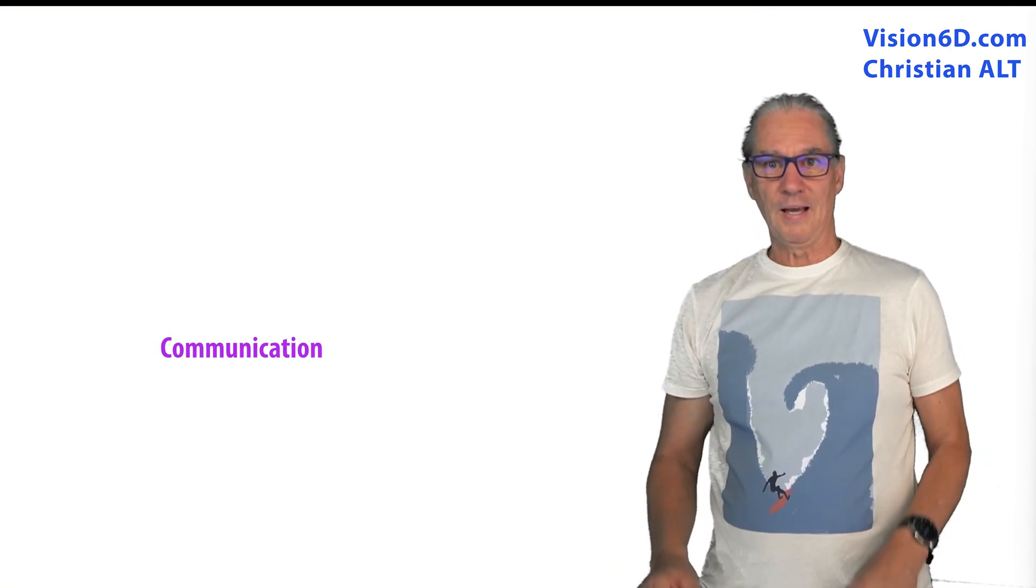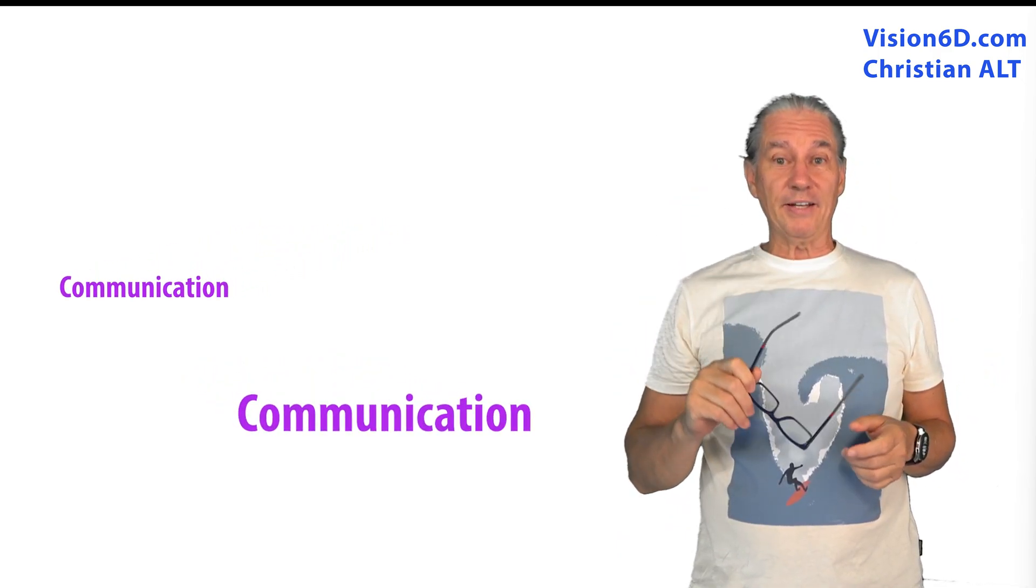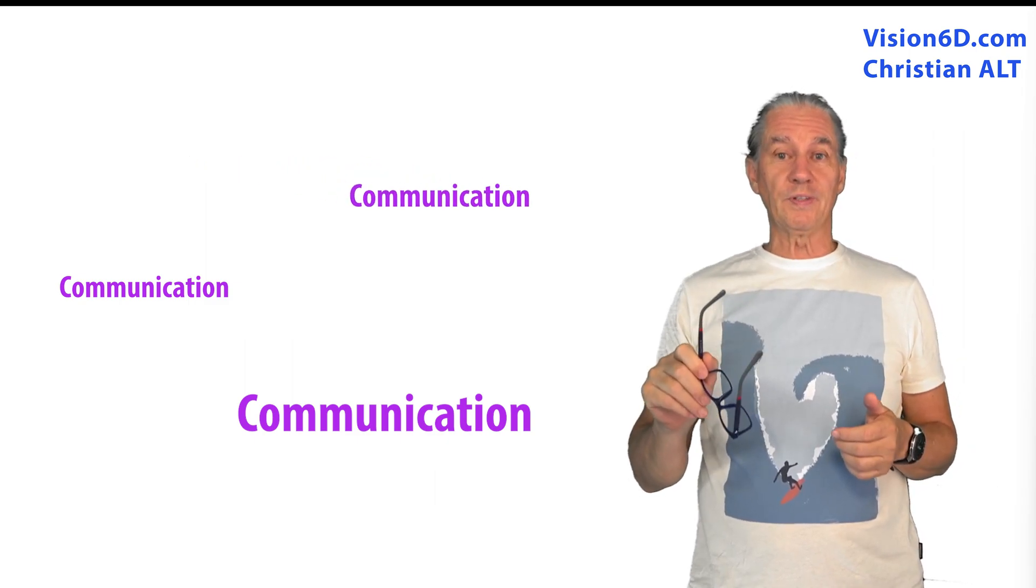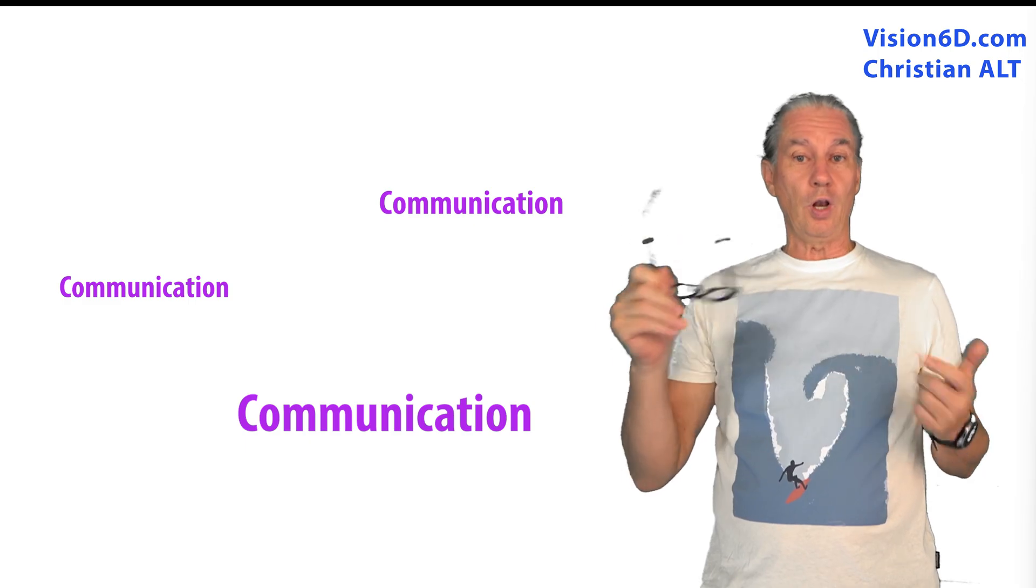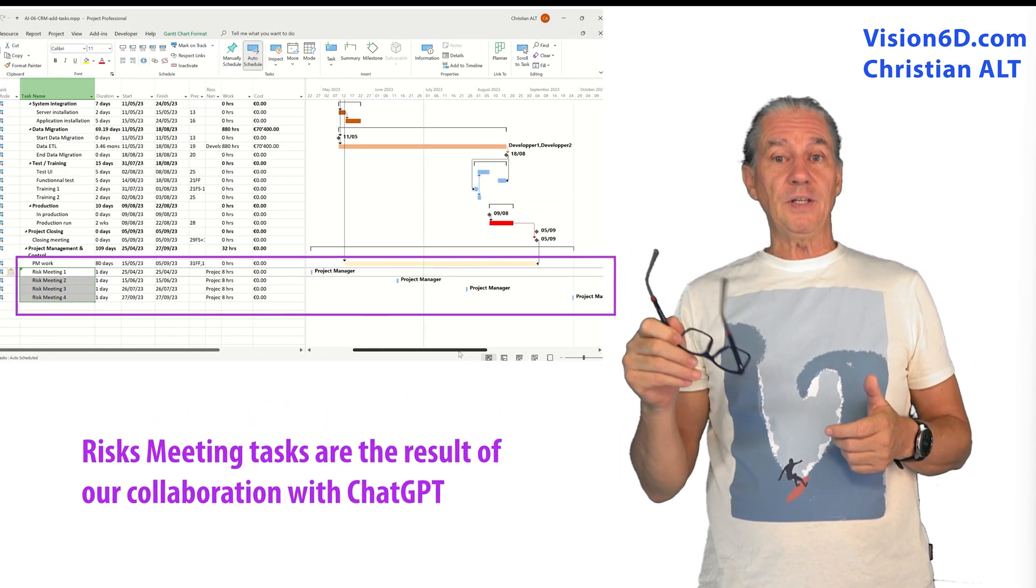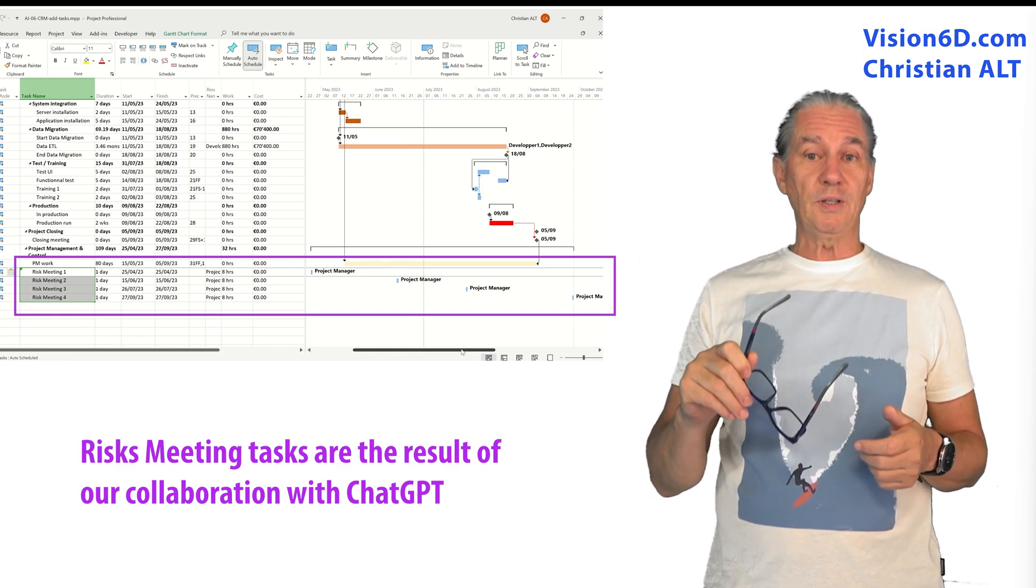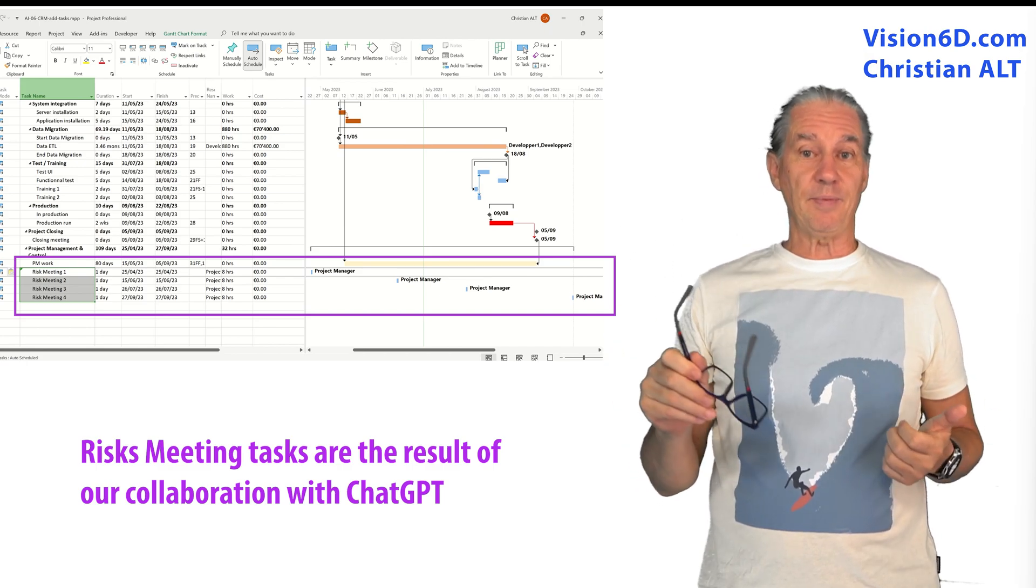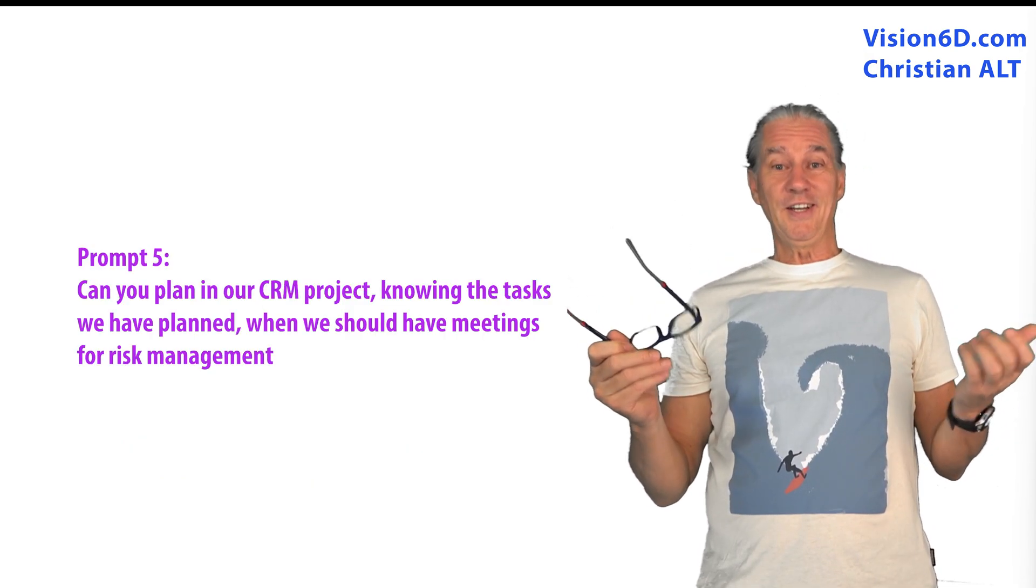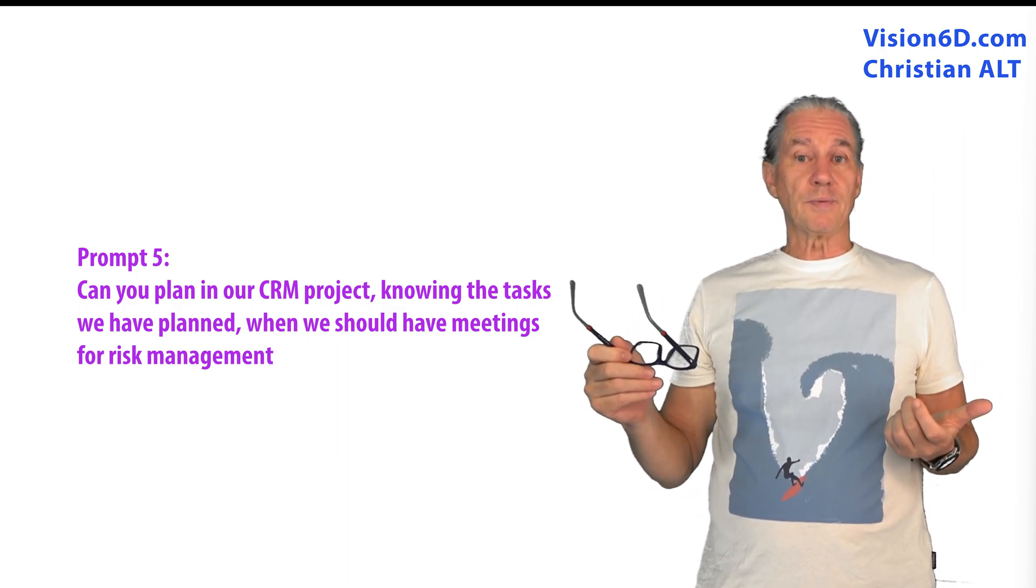So communication in risk management is really something important and risk management is not something that you do alone. So there will be several meetings through all the life cycle of a project where you meet the stakeholders and the team members and SMEs. So what I did I asked ChatGPT to propose me different meetings.